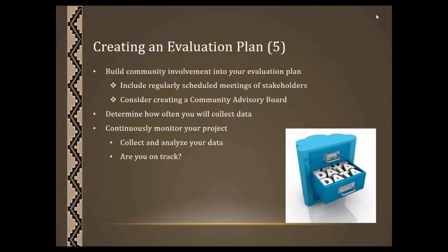You need to look at your project design and determine how often you intend to collect data. It shouldn't all be gathered at the end of your project. You need to plan to collect it over the course of implementing the project. And you also need to make monitoring routine. As you collect information, compile it.